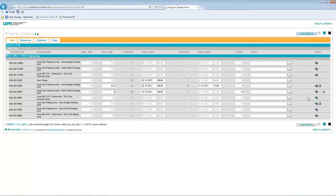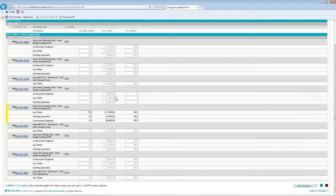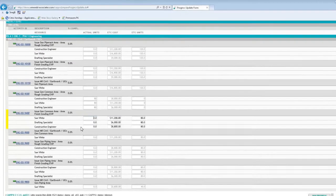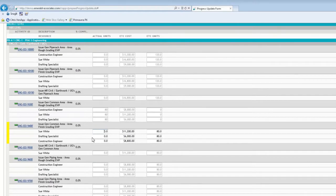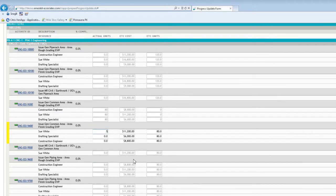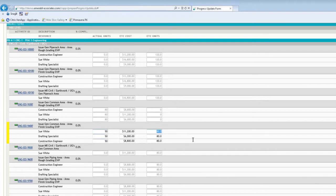And then I will go to the resources section and update the resource usage information. So I have three resources on this task as well, and I will update the actual units, which is 50 for each one of the resources, and the remaining units is 30 for each one of the resources.